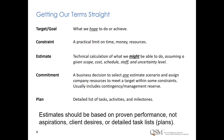The estimate is a technical calculation of what we might be able to do, assuming a given scope, cost, schedule, staff, and uncertainty level. Then we want to enlighten the business so that they can make a decision by selecting one estimate scenario and assign company resources to meet the target within some level of constraint. The plan — the list of tasks, activities, and milestones — comes last.